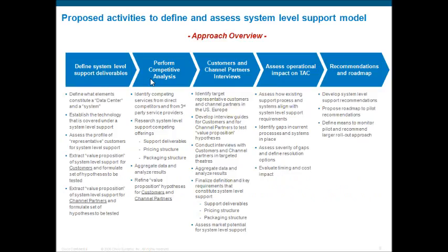And then what you see is what we call an approach overview. This is just a presentation of what you probably have in an Excel spreadsheet or a Microsoft Project plan, right? You're going to have major buckets of activities with sub-activities underneath. You may have a project plan that's 100 lines long with lots of sub-projects, milestones and interim deliverables, etc. But this is intended to be a one-page overview of the key activities of the plan.